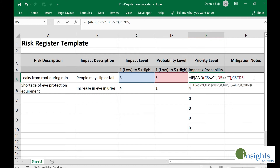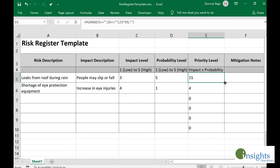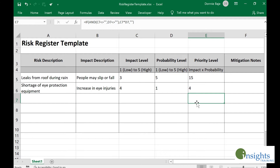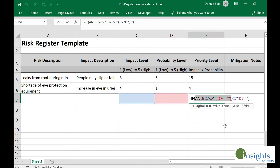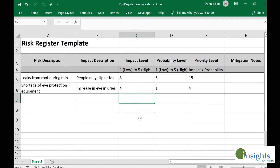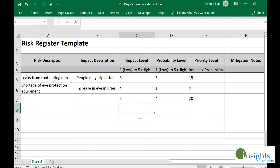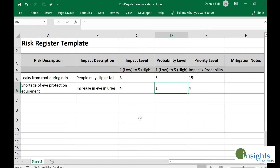If any one of them is not yet filled out, then we put nothing here. When we drag the formula downwards, nothing shows up because the condition requiring both cells on the left to not be empty is not satisfied yet. Let's give it a try — if I put impact 5 and probability 4, that's the only time a priority level number will be calculated. Otherwise, it will be empty. That's how we use logical statements to improve our template.